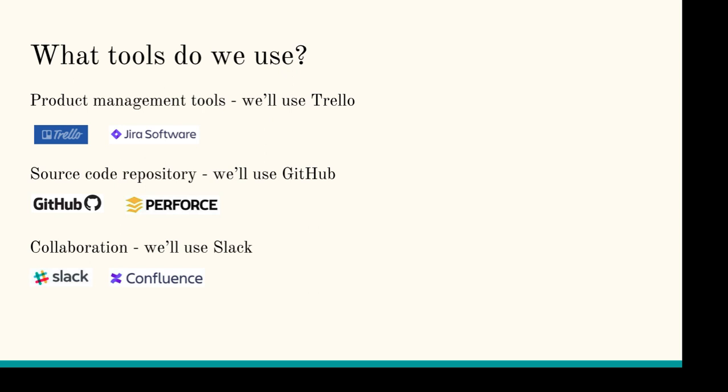I find Trello's a lot more flexible because it's just a Kanban kind of board. You can do kind of whatever you want on it. Jira's very structured in how you use it, and that's what's suited to larger enterprise companies because they have a very structured model. So in Jira, you can define exactly what fields you want in a ticket and exactly how you want to structure those things, and then you force everybody to use it. You can also very well define the process to move a ticket from one state to another, so you force people to go through those steps, and people are following the same steps. Trello's much looser, and you just kind of have to agree how everybody's going to use it. You can't really enforce it.